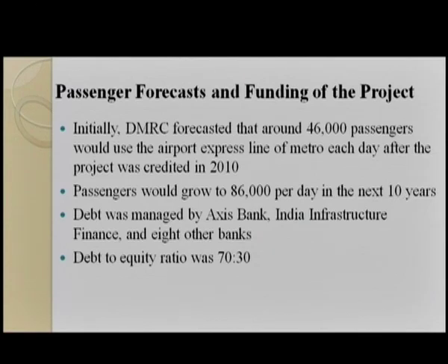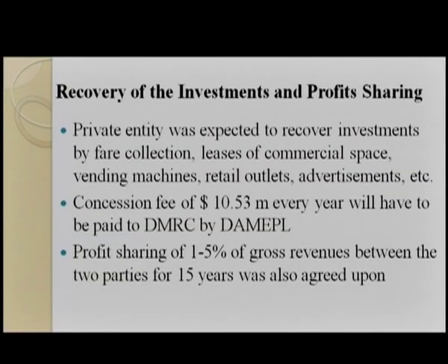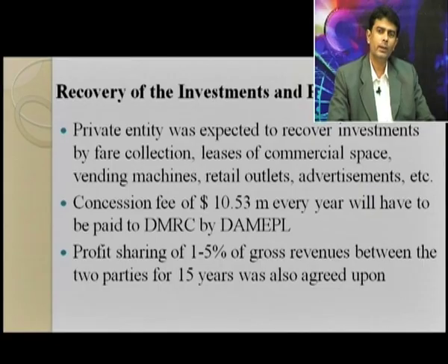Passengers would grow to 86,000 per day in the next 10 years. Debt was managed by Axis Bank, India Infrastructure Finance and 8 other banks. Debt to equity ratio was 70-30. Private entry was expected to recover investment by fare collection, lease of commercial space, vending machines, retail outlets, advertisements, etc.